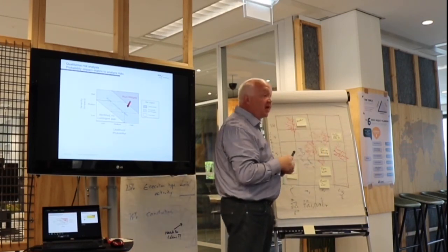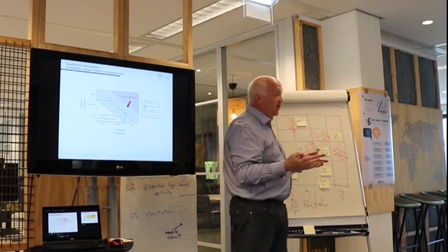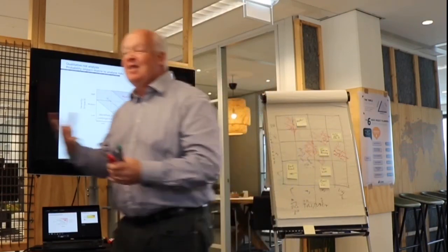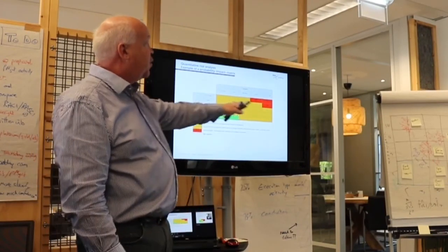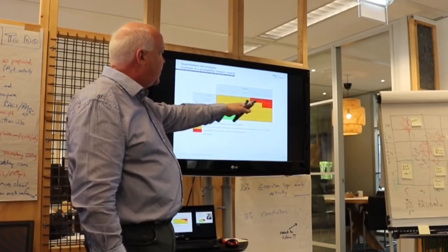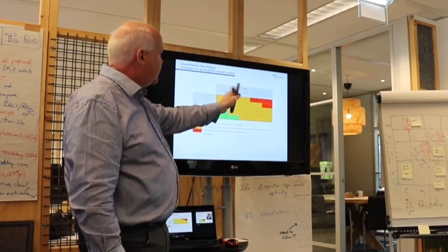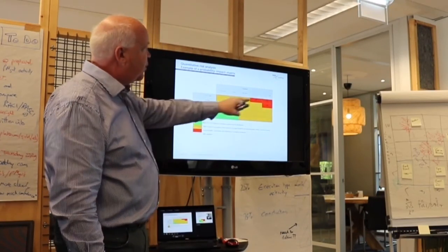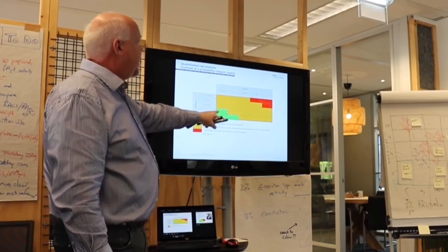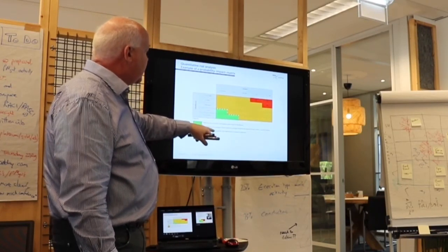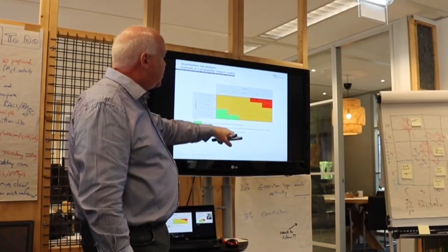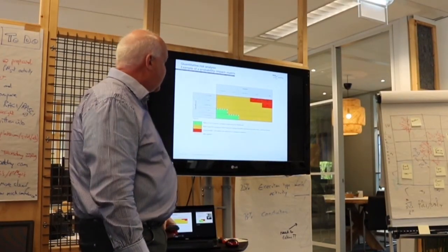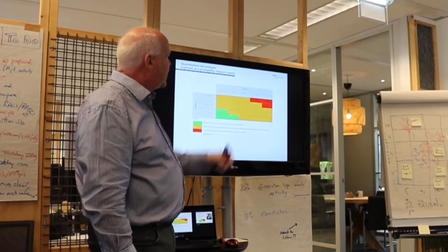So on and so forth. You get the idea? That's what we're doing. That's what you're going to do for your projects. This is the minimum that we should be doing. We can quantify it by putting scoring in, so you'd give each one a value and then one times the other is going to give you a value. And as you said, we're talking about risks that can be accepted, risks that cannot be accepted but we're going to have a plan B, or unacceptable, where we need to do something to physically move them out of that area, and where is our risk appetite for things.